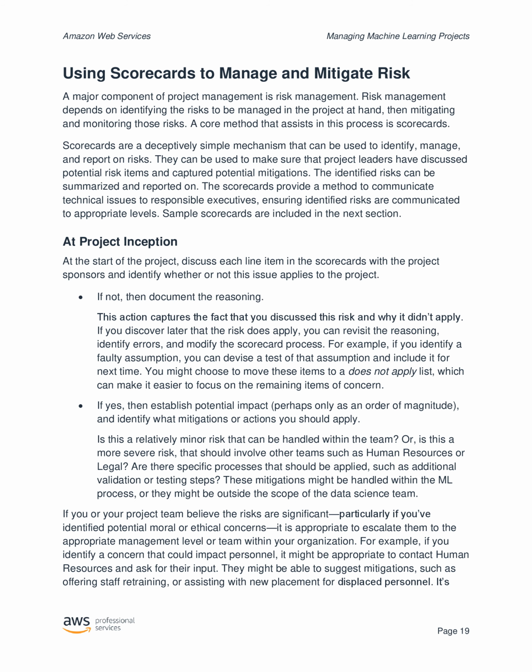If yes, then establish potential impact, perhaps only as an order of magnitude, and identify what mitigations or actions you should apply. Is this a relatively minor risk that can be handled within the team? Or, is this a more severe risk that should involve other teams such as human resources or legal? Are there specific processes that should be applied, such as additional validation or testing steps? These mitigations might be handled within the ML process, or they might be outside the scope of the data science